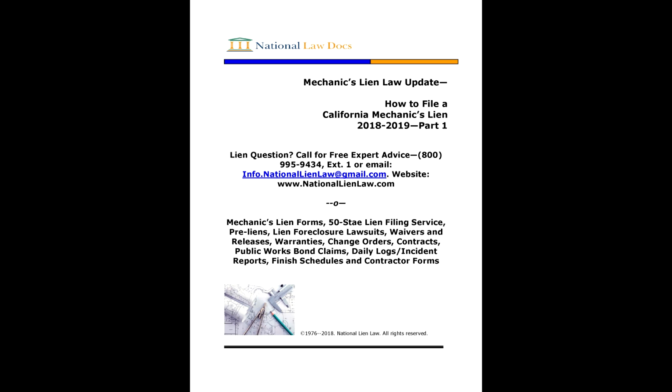The mechanics lien in California is against the owner's title to the property. And if you are a sub or supplier, it is not against any of the property owned by the general. For tenant improvement work, your lien is against the long-term tenant's interest. And this consists, believe it or not, there's some value to this. This consists of the value of the lease and the trade fixtures.